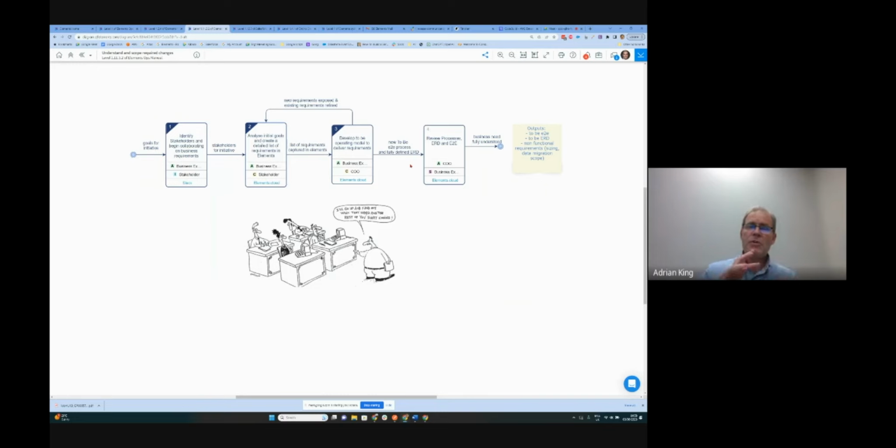We find that it's a very symbiotic process of doing the process mapping and the data modeling. As you're going through the process map, if you realize that there's some information, some data that you need to run the process and it's not on the ERD, clearly the ERD isn't complete. But more often, we discover that as you're going through the data model, nowhere in the process are you actually creating a piece of data or a relationship linking things together. And in that case, your process isn't complete. And you've got to review the process to ensure that all the activities exist to make sure that the data is in the correct state at the end of the process.